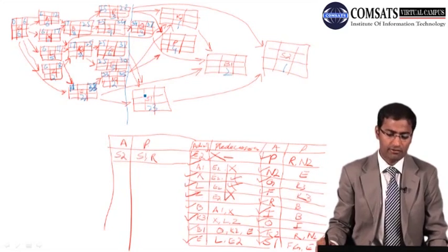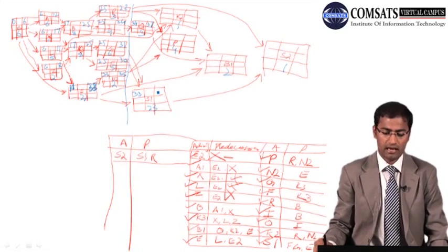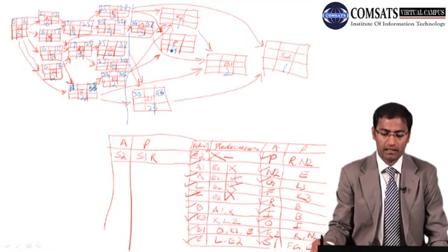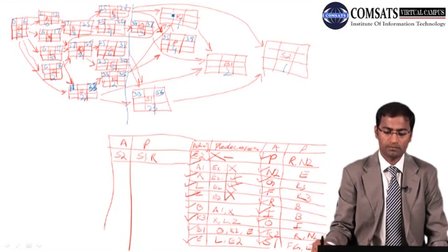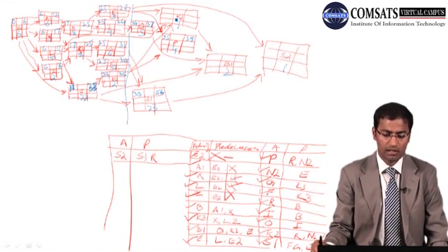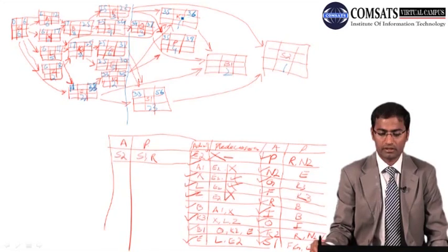For this we have 3 activities, 31, 30 and 33, so put 33 over there, and 33 plus 23 is 56. Activity P is dependent on R and N2, so 35 will come over there, 35 plus 4 is 39. And activity K2 is dependent on N2, so 35 will come over there, and this will become 36.